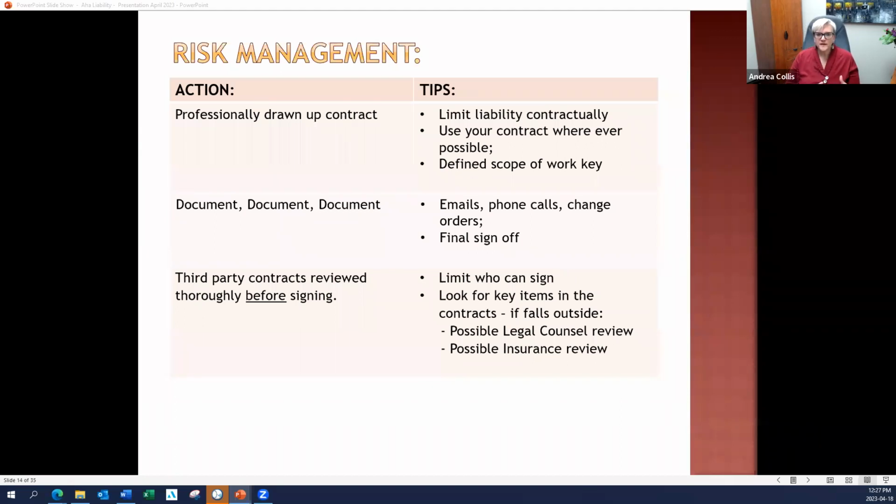And my example would be that if it's a $2,500 contract, but it's going to cost you $5,000 in increased insurance, then you're going to clearly be comfortable in walking away from that project. But if you've got a $250,000 project or a $2 million project, and it's a $5,000 or maybe even a $25,000 increase in your insurance, at least you know, and you can either negotiate with your client about the terms of that, and you can either negotiate it down or negotiate that they'll pay a portion of those fees, but at least you know what those things are before you've signed that contract.